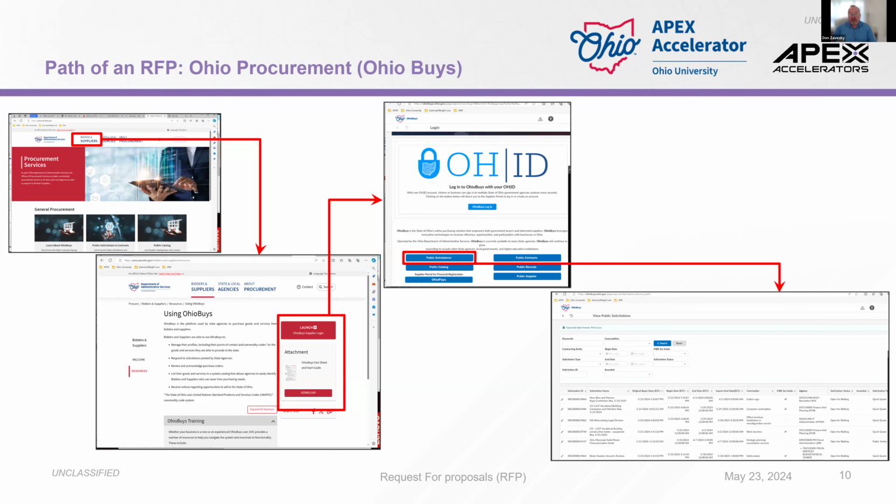Now, what you're typically going to encounter with that is an indefinite delivery, indefinite quantity. So we don't know how much or when, but we know that we're going to do it. Typically what you do is you quote on a certain square footage or a unit price or an hourly rate, and it's going to depend on what the contract entails, or if they're ordering supplies, you may be quoting a unit rate with shipping and all that. So you just give them a set price, and then essentially they can order task orders against that. But it's really a case-by-case basis depending on the contract.